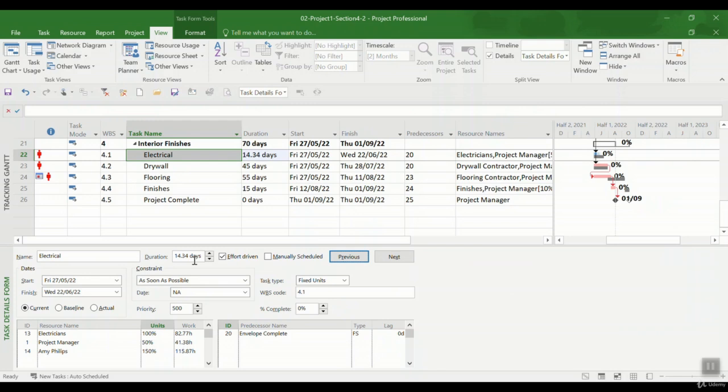If you add more resources, it doesn't guarantee that you can do the task in the duration that you plan, but you are trying to do so, and you have to make sure that the resource that you use is capable of doing the task the same as the others, or that the nature of the task makes it possible to reduce the duration by adding more resources. So if it is a meeting type task, the more people you add, the duration won't be shorter, it's going to be even longer. So it's important to know this.